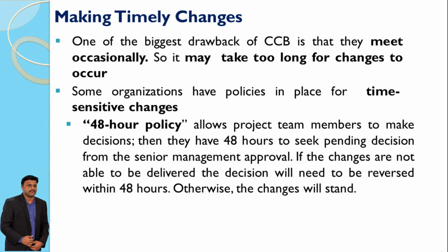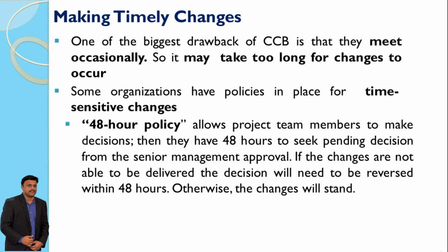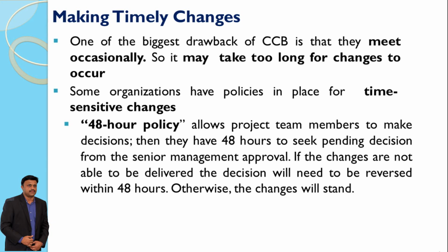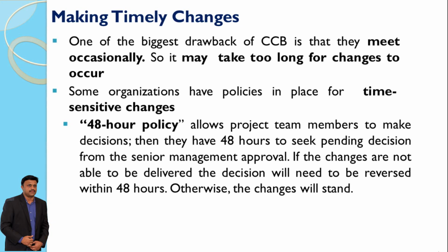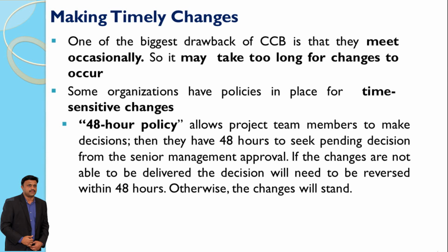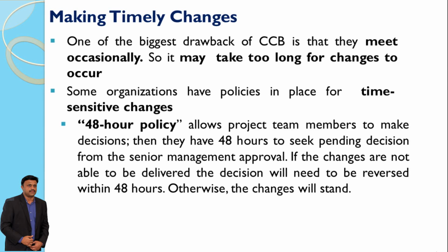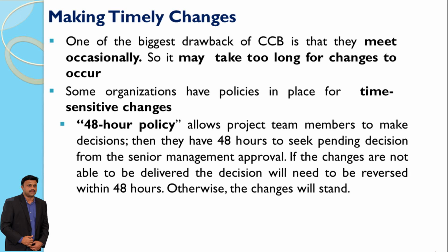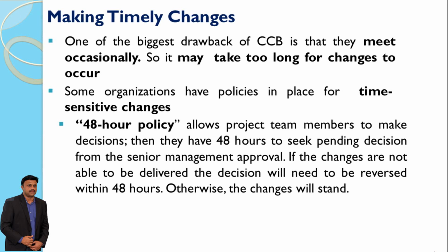One drawback of the CCB is that they meet occasionally, which can delay changes. Some organizations implement policies for time-sensitive changes, like the 48-hour policy, allowing project teams to make decisions quickly, with pending approval from senior management.